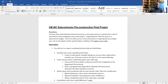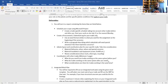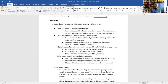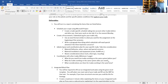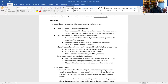Now your deliverables. The first part has four different things. The first thing is a schedule and then a procurement schedule. You need to schedule your scope of work and create a trade-specific schedule. This is just for your trade, but you need to take into consideration other trades that may be working around you. If you're a mechanical contractor, you need to take into consideration plumbing and electrical, and show me where they are in your schedule.